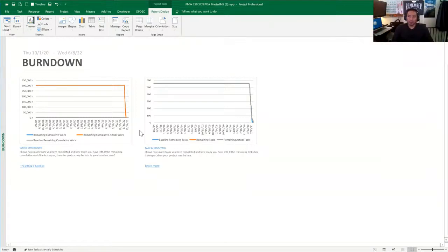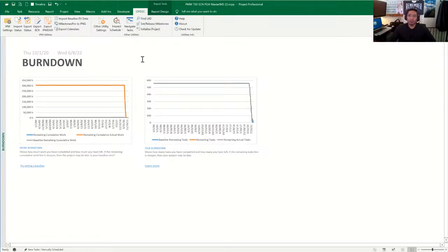It depends on the environment. We use OpDeck, as you see here on this tab. It's a paid license, but there's an option within their website where you can use their schedule health tool that inspects different types of areas within the schedule, mainly for government use. You have your DCMA 14-point metrics, which is the metrics that we use in the DoD environment, that keeps our schedule on track and helps identify those types of errors.